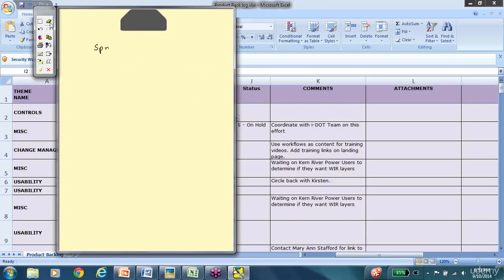So usually at the beginning of the sprint, you will have your backlog or the user stories that are going to be a part of this sprint. At the beginning there is going to be something called the sprint planning meeting. So the initiation of the sprint will start with a sprint planning meeting, and in this the entire Scrum team would participate, and then you would develop a strategy on how we are going to approach the building, how we are going to approach the testing. In addition to strategy, you'll also come up with dates and timelines and what kind of deliverables is expected.